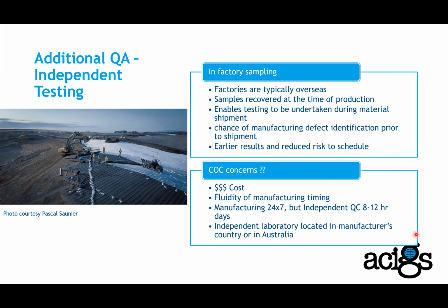The other factor to consider is that manufacturing is 24/7 in most factories, but independent testing is like 8-hour or 12-hour days. So it is very difficult to have 24/7 surveillance in the factory or sampling. Independent laboratory located in the manufacturer's country or in Australia. This is another topic I'll talk about a little bit later: some independent laboratories are located in the manufacturer's country, and we need to consider certain elements there if we decide to go with that option and test overseas rather than in Australia.